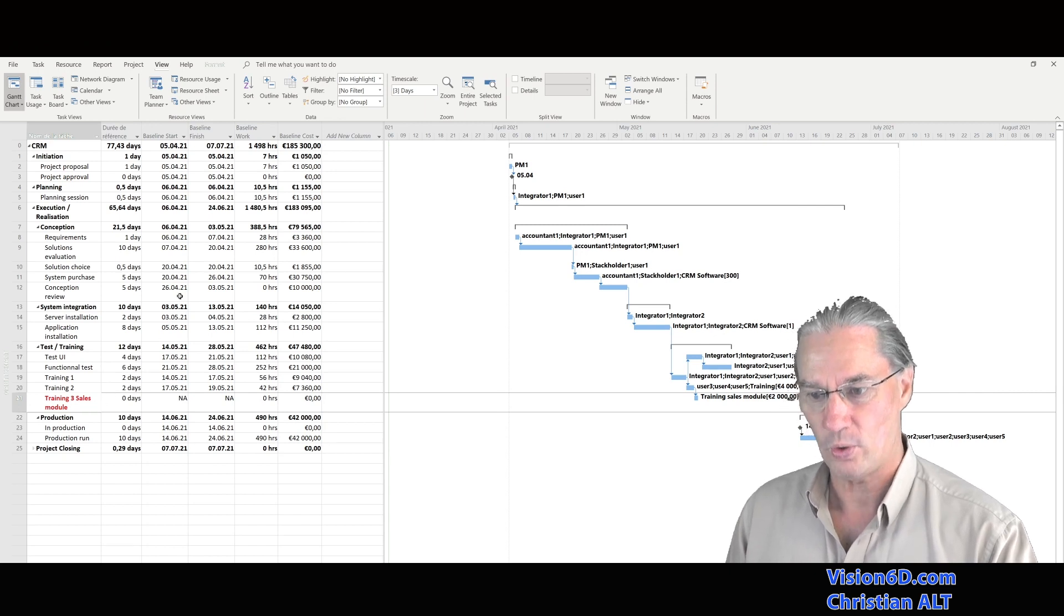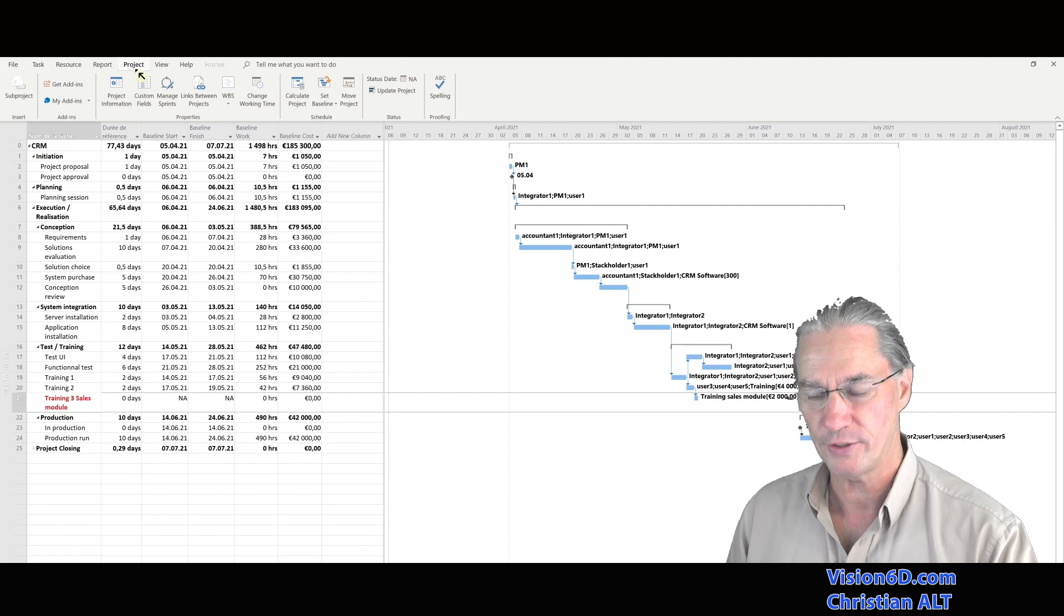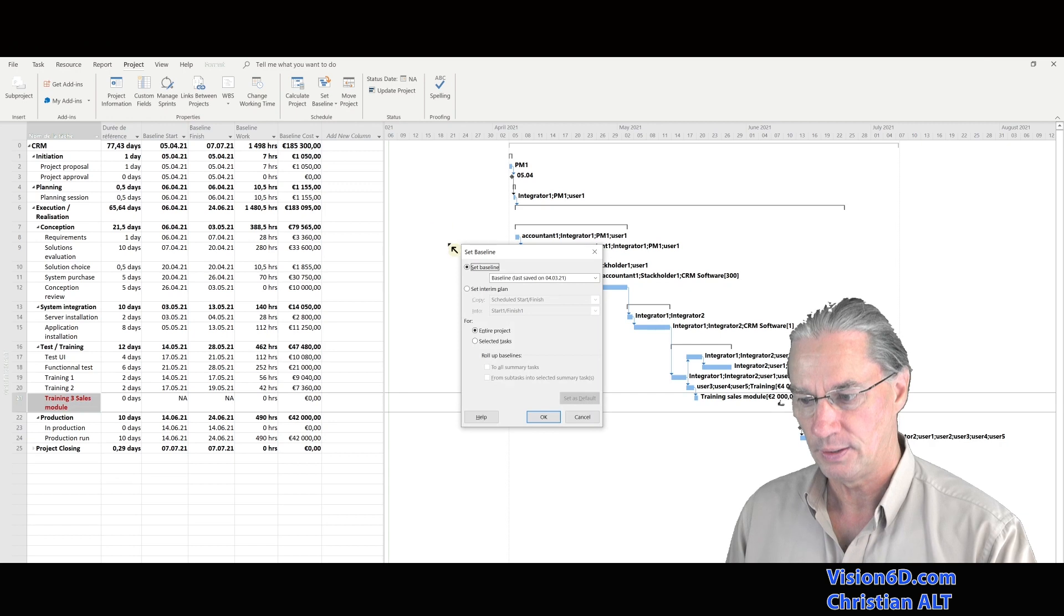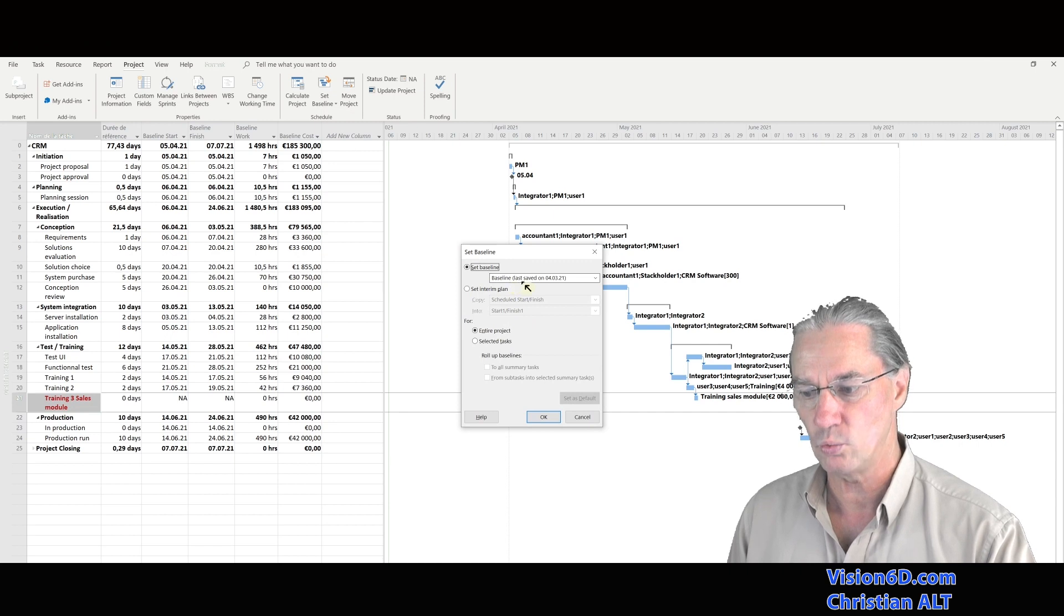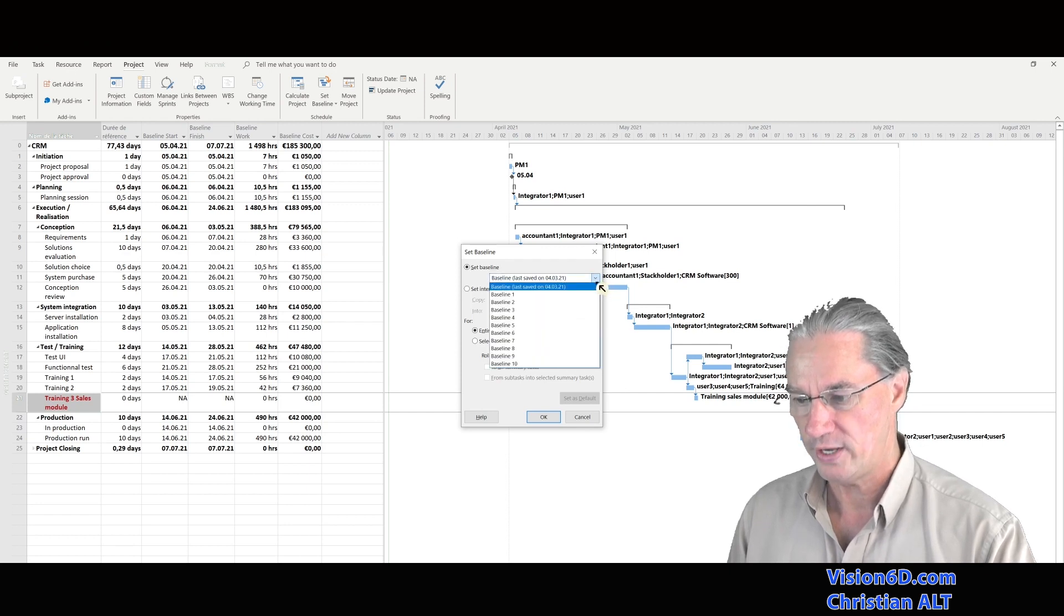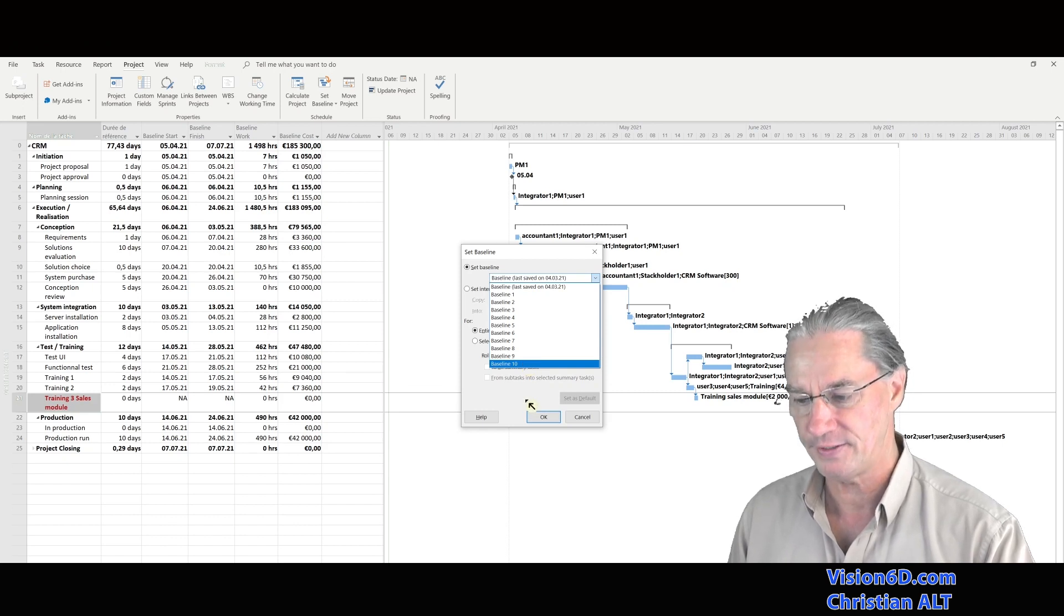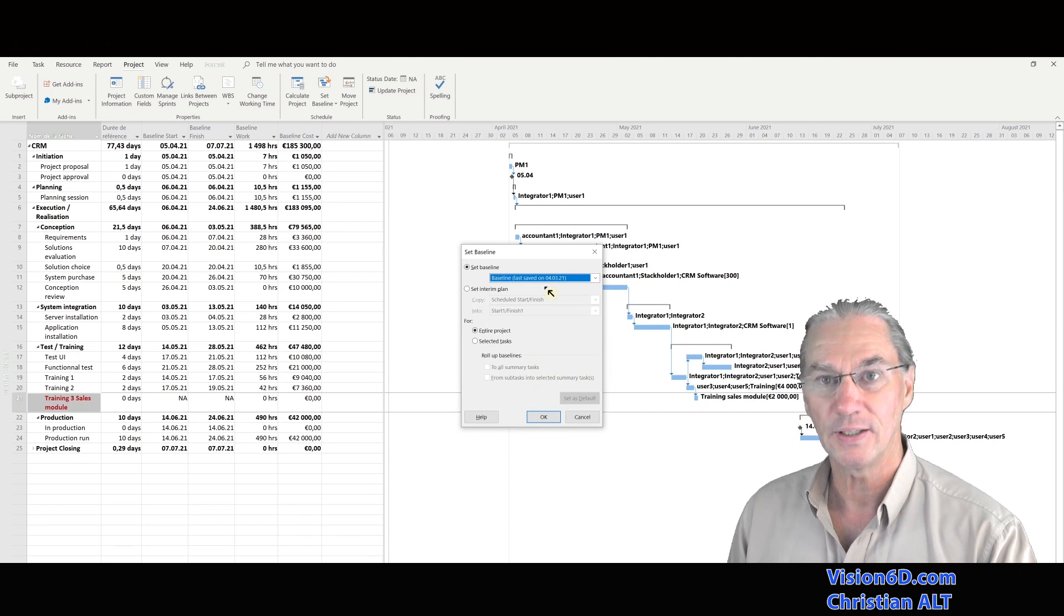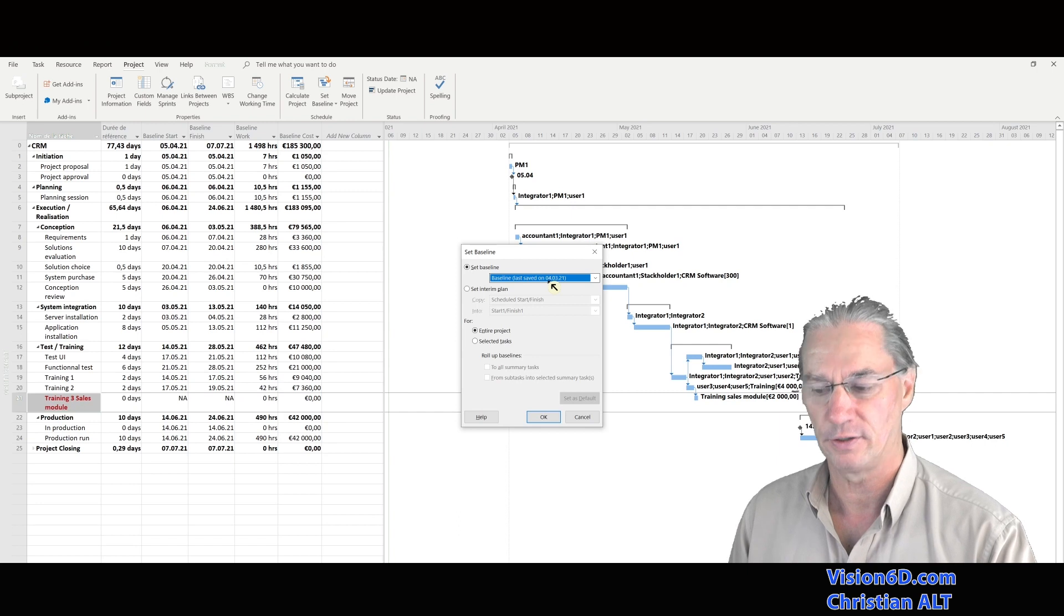So what I'm going to do is to go here up into project. And I'm going back to set baseline you see here. And among the baselines here, there are the different possibilities. And you see that we have a defined baseline by the 4th of March 21. We have here the possibility to have up to 11 baselines.